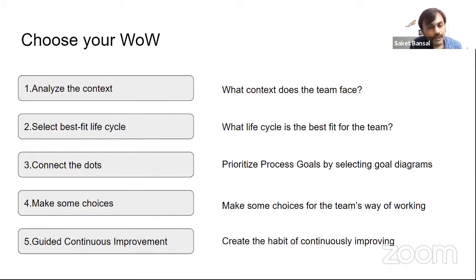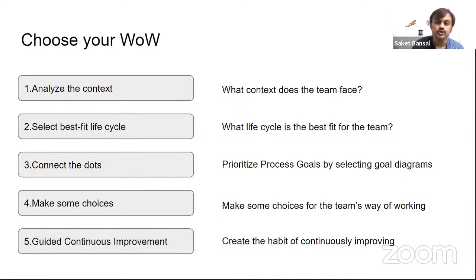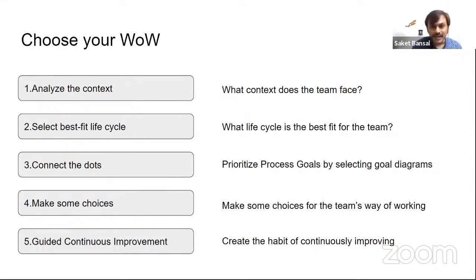There could be one lifecycle which may look like Scrum, another which may look like Kanban, or another which might be a project way of working where you have a project charter, initial level of funding, milestones, and a governance process in place. It's very difficult to say an organization will always do continuous delivery or always do a project. There could be areas where project ways of working are needed and areas where continuous delivery is needed.